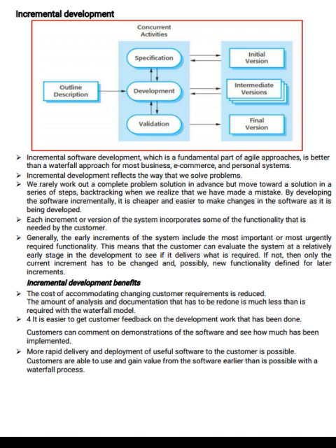Now let us see incremental development benefits. The cost of accommodating changing customer requirements is reduced. The amount of analysis and documentation that has to be redone is much less than is required with the waterfall model. It is easier to get customer feedback on the development work that has been done. Customers can comment on demonstrations of the software and see how much has been implemented.